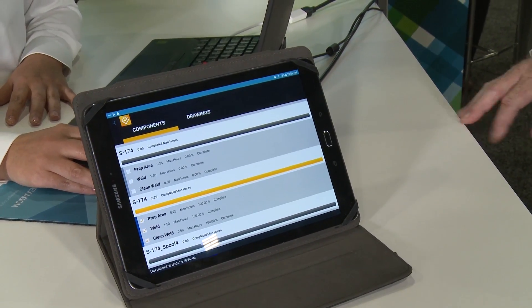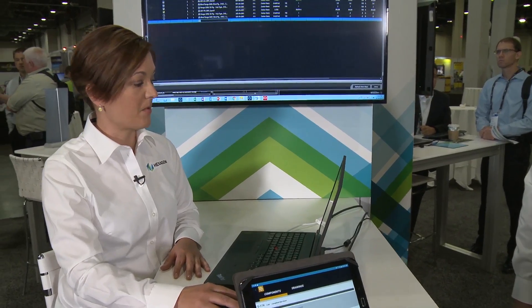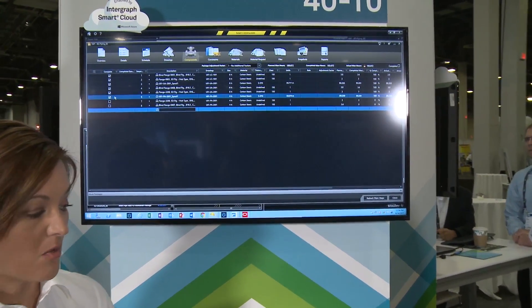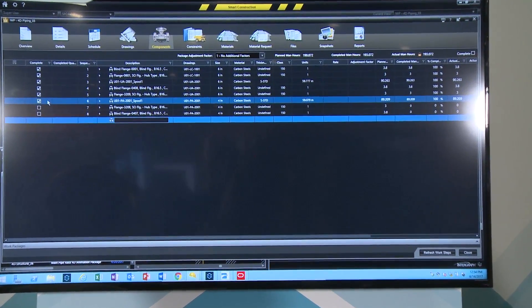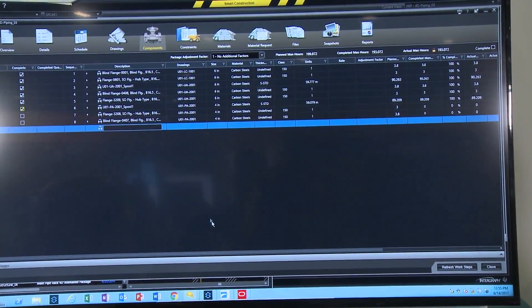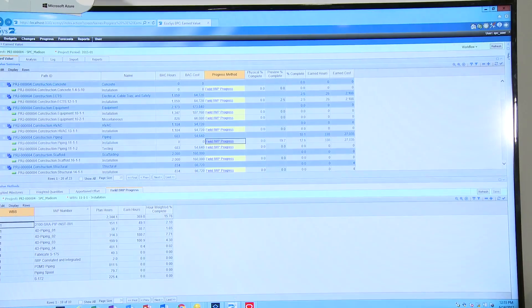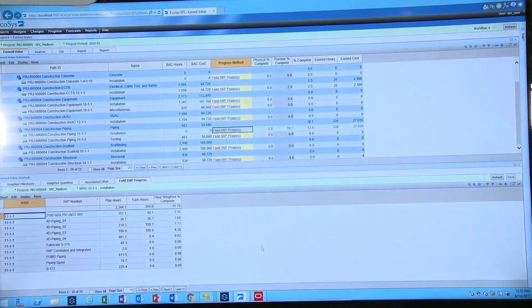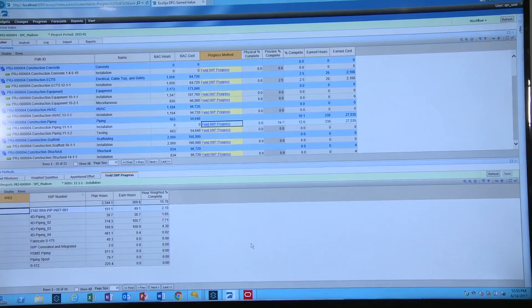On the work package shown on the monitor, you can see the progress that has happened. The components have been checked off, and once those are checked off and taken into consideration, they can then be uploaded into Ecosys, which allows us to track our earned value.